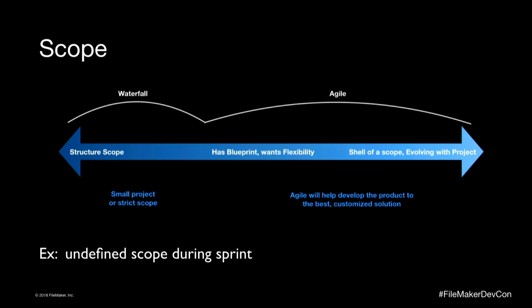You still have to write out your requirements. And that has to be done very quickly. And they were unwilling to put any of their tasks and any definitions into Jira. So that stopped the process, and we had to spend days, sometimes half the sprint, just to figure out all of the requirements. That is not agile. That is mini waterfall projects all in one.